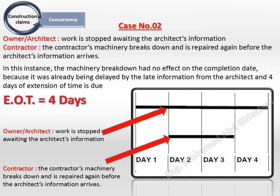Case number 6. Owner situation: work is stopped awaiting the architect's information, four days. Contractor situation: the contractor's machinery breaks down and is repaired again before the architect's information arrives.